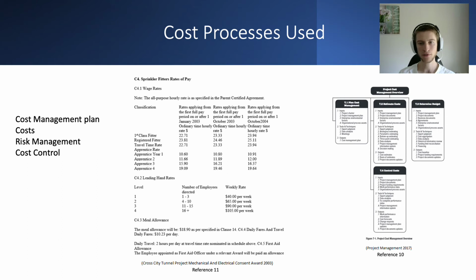However, the final cost of construction was over budget at $680 million. This represents under a 10% variance from Cross-City Motorway's original estimate. By the end of the project, there was almost $600 million of debt which would have to be repaid. This was likely due to several factors including scope creep, inadequate cost inputs, and poor cost control.